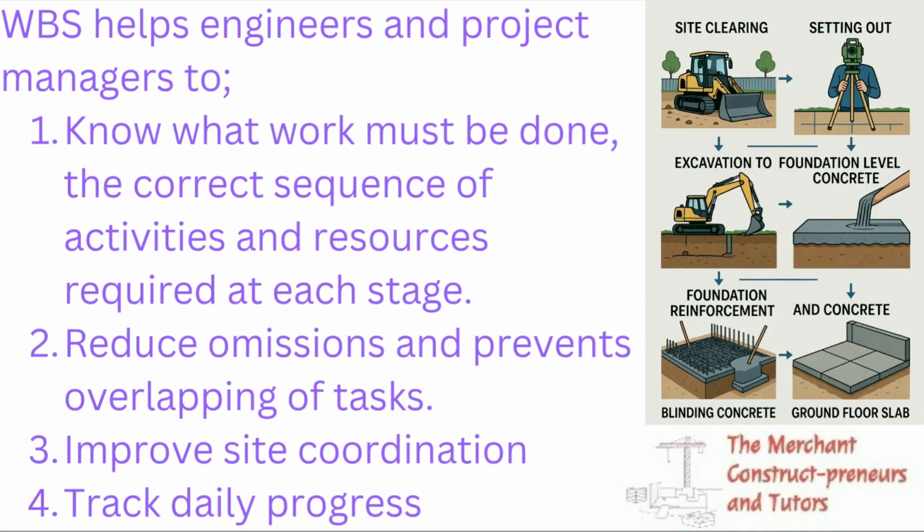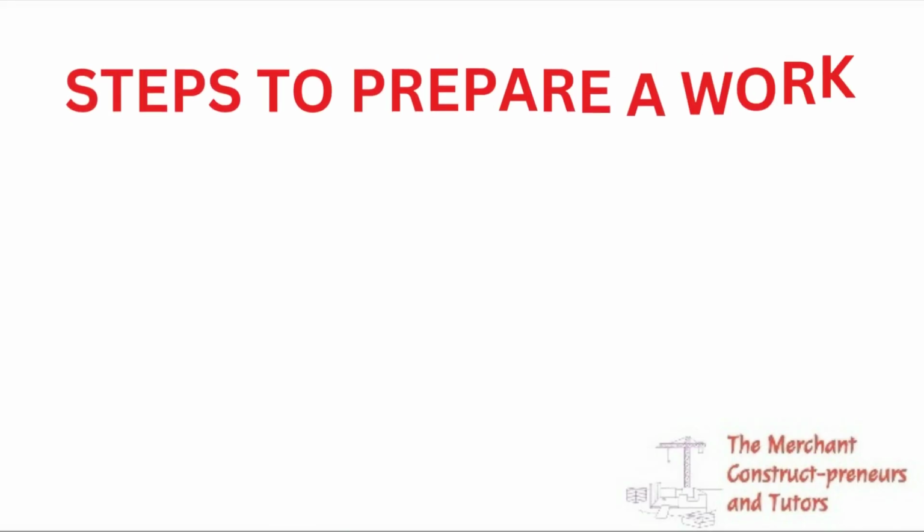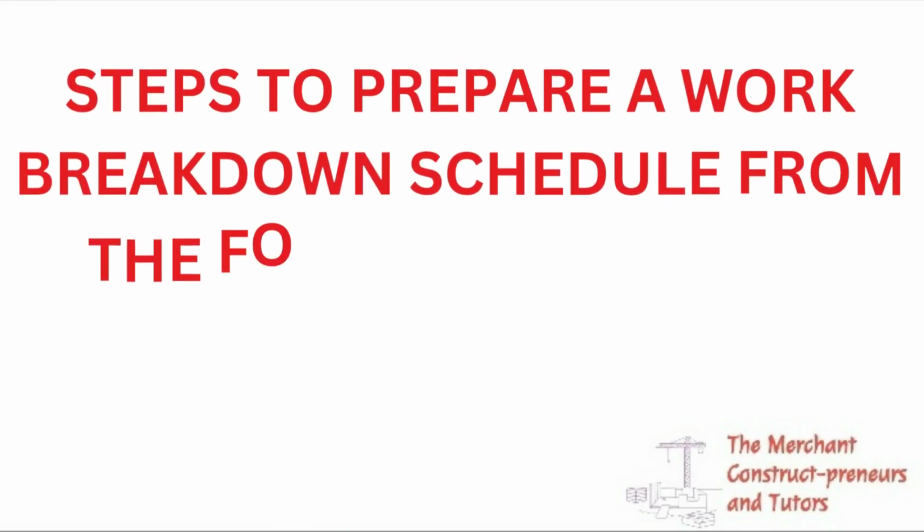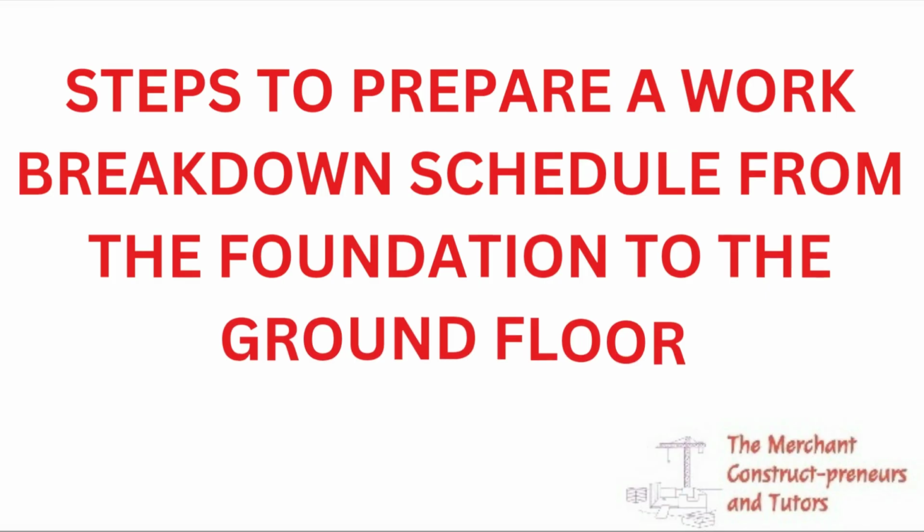Once you break this down, it helps you to see the loopholes of what you have omitted before, and it also improves site coordination. Everybody knows what to do at what time and when to come in, especially when the site is tight: what machines need to come in, how to remove excavated materials and cut them away from site, stockpiling of materials and all that. Then, track daily progress. These are very understandable, and you can see how this works.